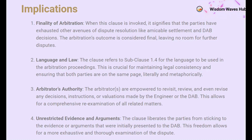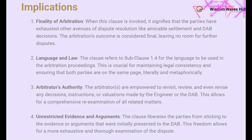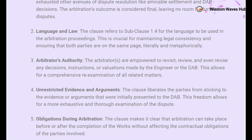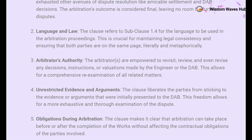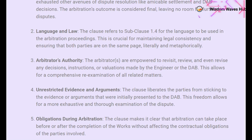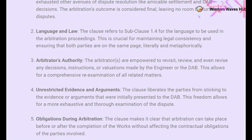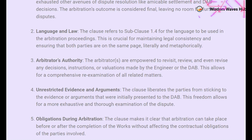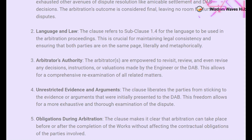The language used in the arbitration proceedings is critically important, as referenced in Subclause 1.4, and is crucial for maintaining legal consistency. It ensures that everyone is, quite literally and metaphorically, on the same page throughout the proceedings. The authority granted to the arbitrators is extensive — they have the power to revisit, review, and even revise any decisions, instructions, or valuations made by the engineer or the DAB. This level of comprehensive re-examination allows for a more nuanced and thorough resolution, but also introduces a level of unpredictability.